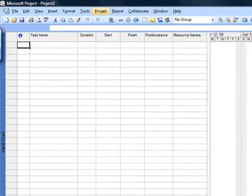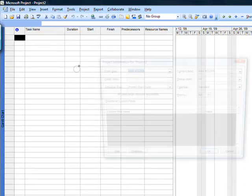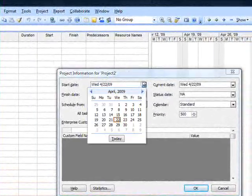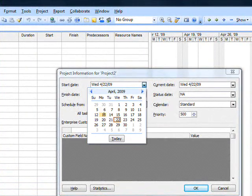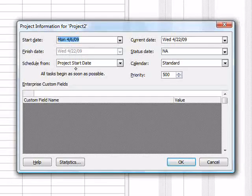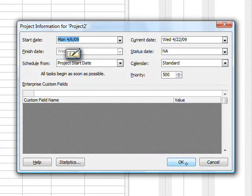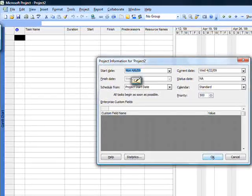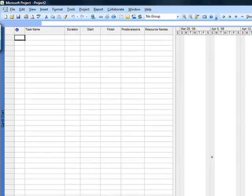Go to Project > Information. Set the project start date — let's set it for that Monday. Schedule from project start date. That's a good convenience. We'll deal with status date later. Click OK.